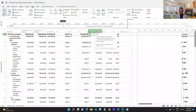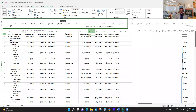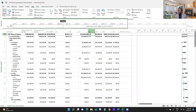Remember, these indicators do not tell you what's going to happen in your project at the end — we're going to talk about forecast indicators in a different video. What you need to remember is that SV (schedule variance), SPI (schedule performance index), CV (cost variance), and CPI (cost performance index) measure past performance, not future performance. They look at what you've done so far and how efficiently you've done it. Watch for the next video on project planning and controlling with Microsoft Project. Thank you for watching.